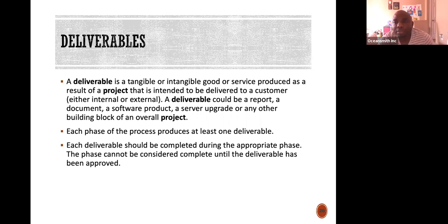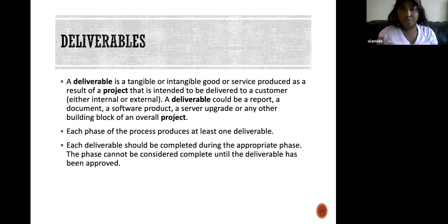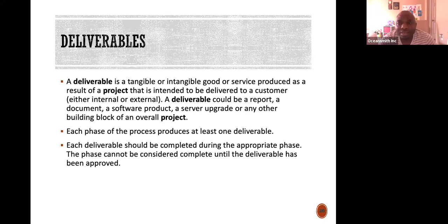Once you do that, prioritize the requirements, let them sign off on the requirements, let them put a date on it, and also send the requirements to the project manager to build a schedule around it. You see all those tasks? Once you finish, those are your deliverables. You got it, right? I understand. I got you. Yeah, cool.